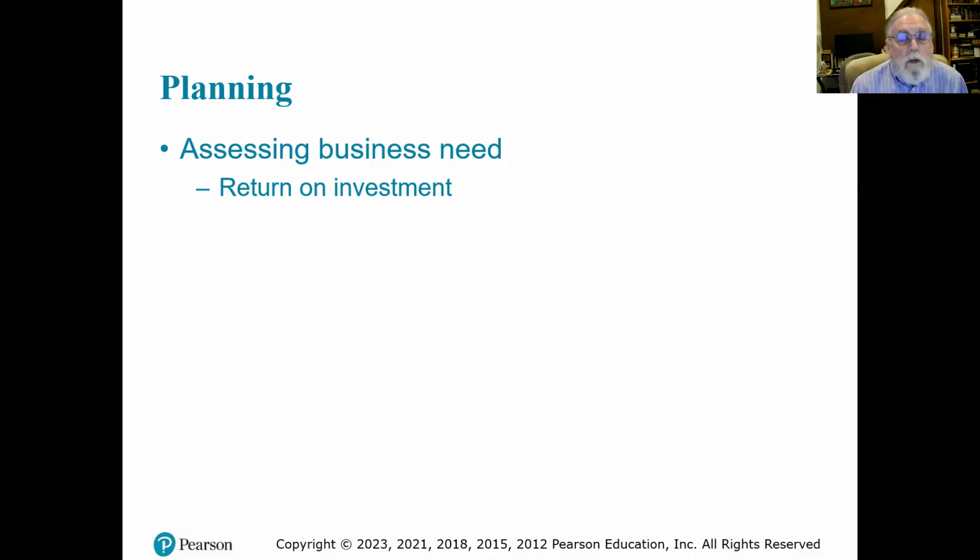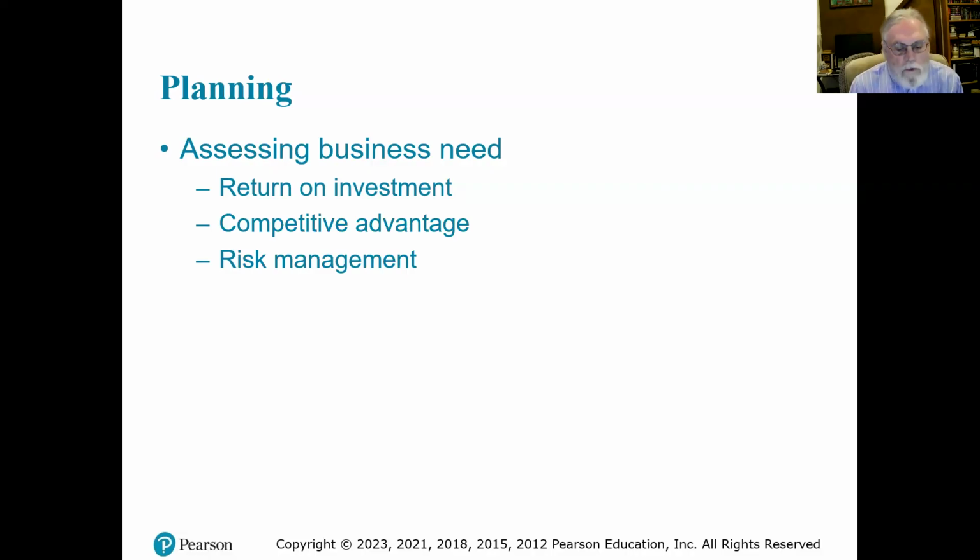And depending upon your organization, you may need to recover that initial investment in as short as 2 or 3 years' time. Some organizations with capital equipment, it might be 5 or 6 years. But the key is you have to always be looking at what are we getting for our money? Does it give us a competitive advantage? Or does it address a possible threat, a risk to our business, our organization? So there may be that as well.